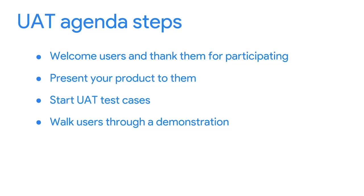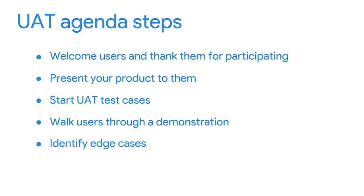For instance, the call to action for your project may be the need to test hardware in the client's future home. Maybe the homeowners have requested a dishwasher that can be opened and closed with very little force and doesn't make too much noise. In that case, you'll want to give the client real-life scenarios to work within — ask them to load the dishes and start the wash cycle, then ask questions like: on a scale of 1 to 10, how much force was required to open and close the dishwasher? During your presentation and walkthrough of the UAT, you should be collecting feedback from users on their overall experience.